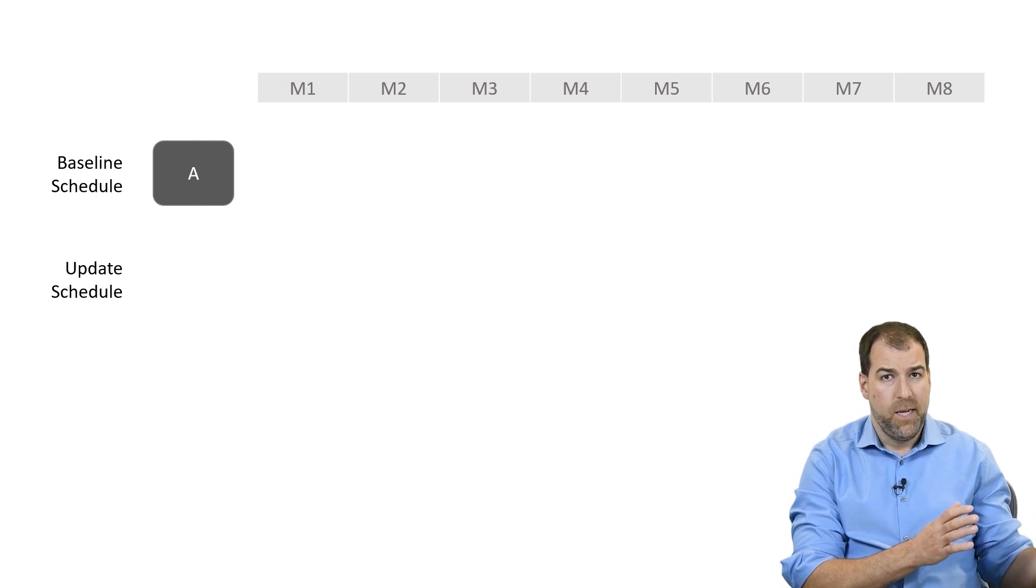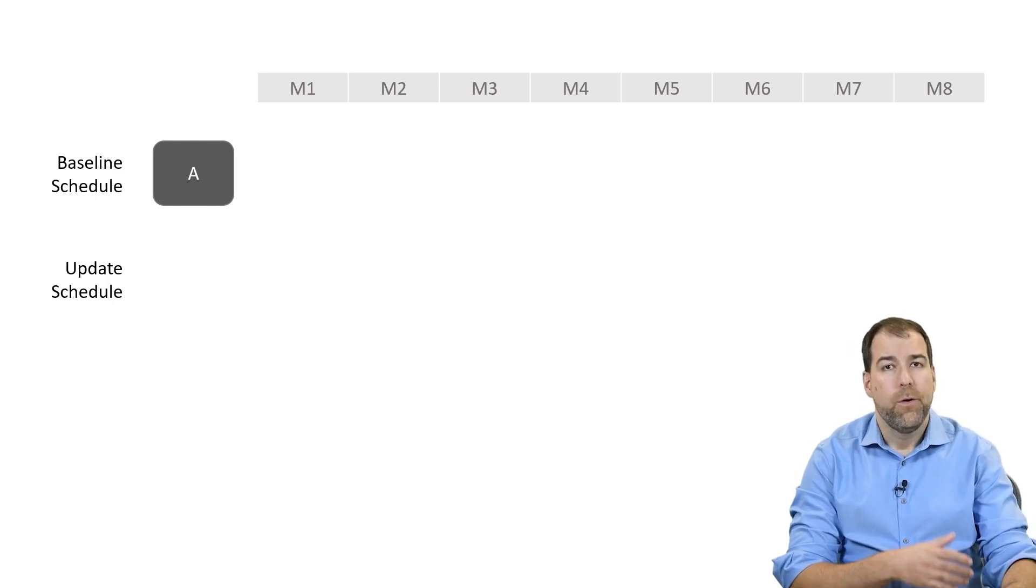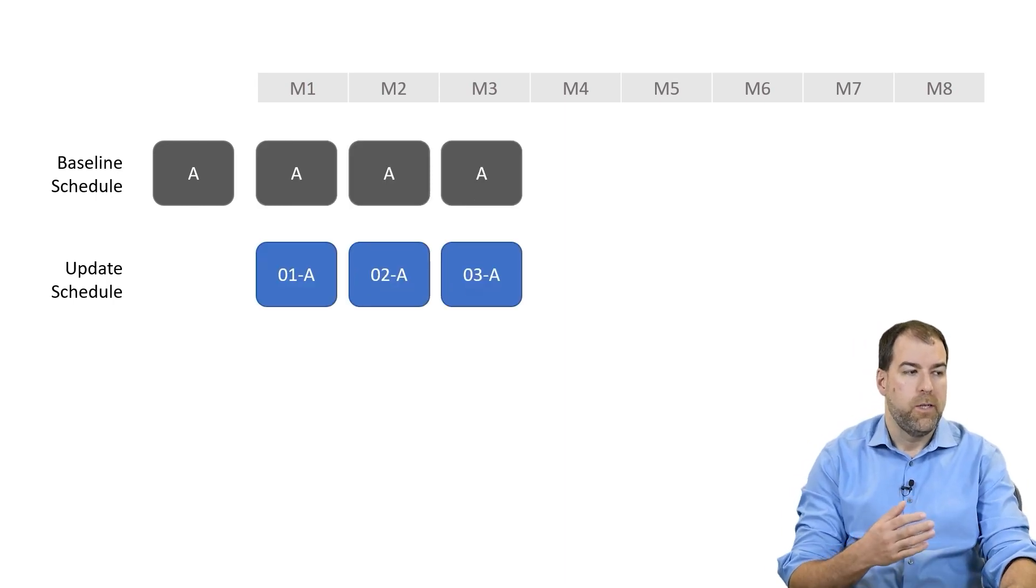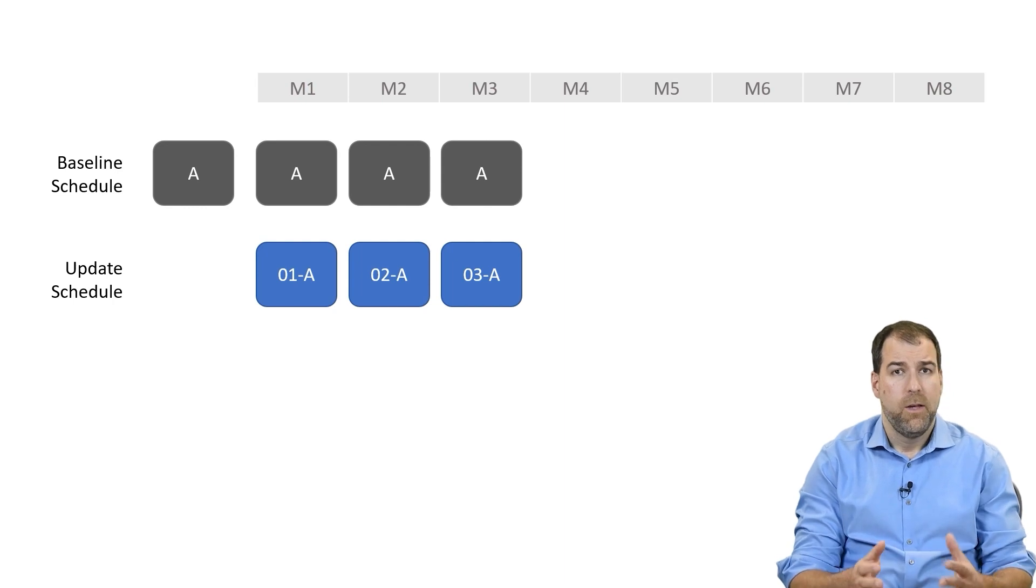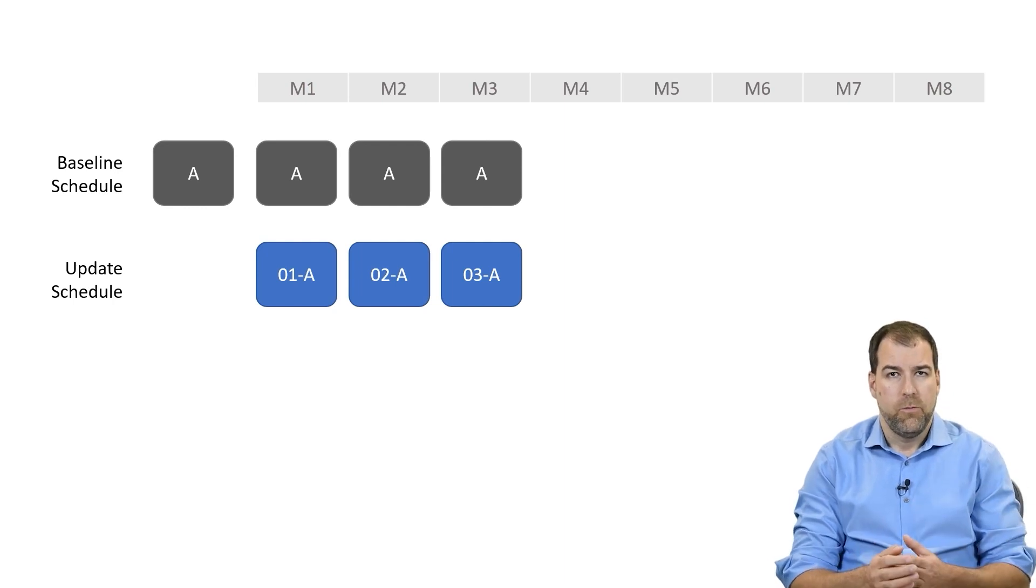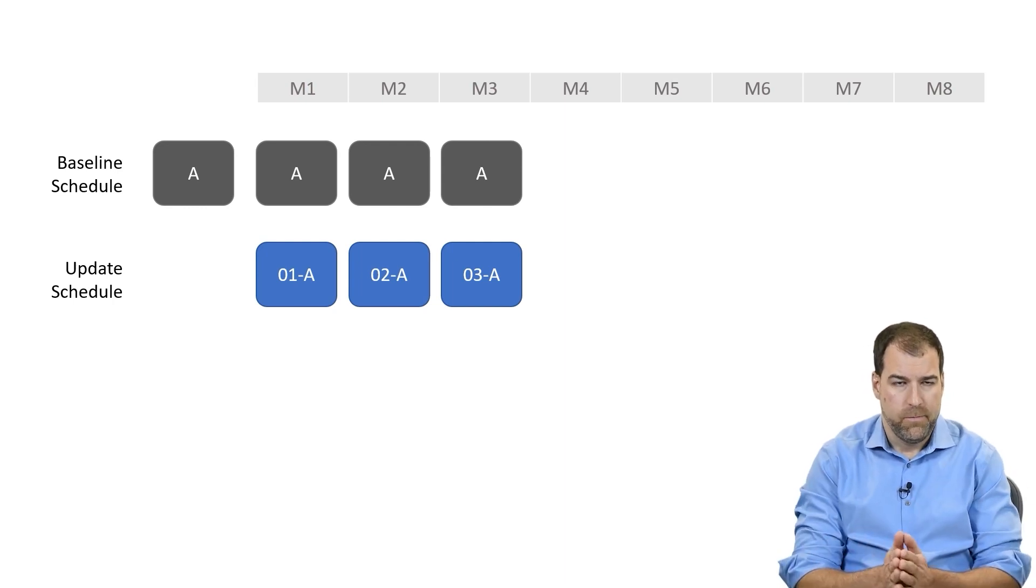We have our baseline, Baseline A. We're going through our progressing process each month, developing a new progress schedule 01, 02, 03.